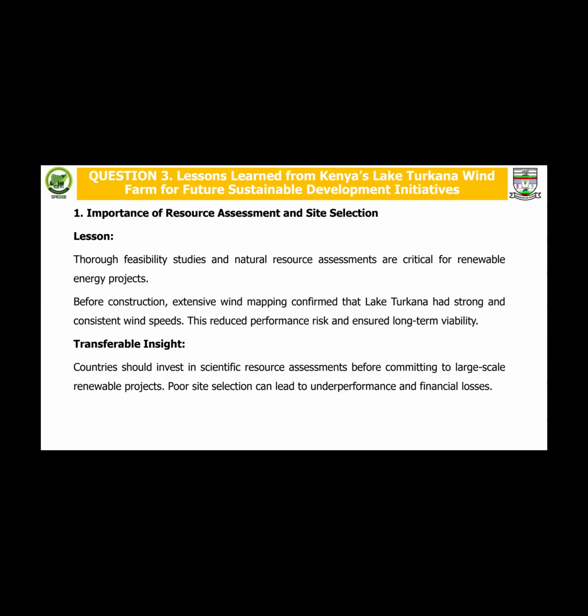Transferable insights: countries should invest in scientific resource assessments before committing to large-scale renewable projects. Poor site selection can lead to underperformance and financial losses.